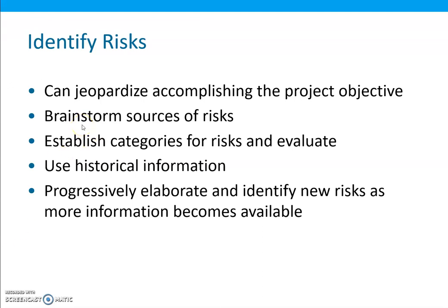In brainstorming, a project manager should involve the key project team members in identifying potential sources of risk, things that could happen that would negatively impact accomplishing the project objective. Each member of the project team can bring his or her experience and insight to help develop a comprehensive list of risks. How many risks should be identified?